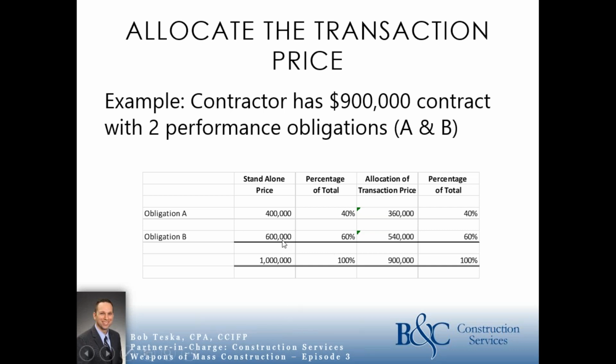And so, if I was doing these separately, it would be about $1 million. However, because the obligations are in one contract, you don't have to get things going twice. You're already there. Economies of scale and such. You bid them together, and it's only $900,000.